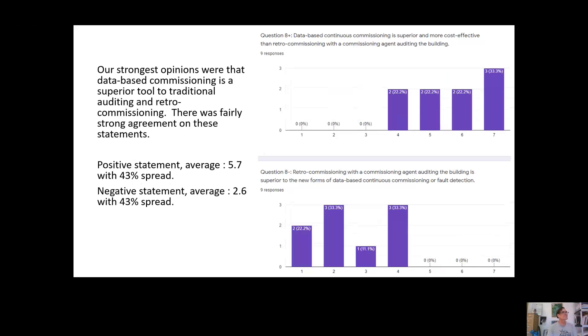This next question is even more interesting because the question was database continuous commissioning is superior and more cost effective than retro commissioning with the commissioning agent auditing the building. The negative version being retro commissioning and commissioning with an agent is superior to these new fangled forms of database continuous commissionings. This was our strongest opinion. We definitely agreed with the positive statement. We definitely disagreed with the negative statement and our agreement on these was fairly strong. This is a commentary on the state of affairs in ASHRAE. ASHRAE doesn't even have a standard or guideline for database commissioning or database continuous commissioning. The guideline zero, guideline one, the ASHRAE standards and ASHRAE guidelines that we have on commissioning are entirely dedicated to the boots on the ground type of commissioning that we all said was the inferior technology.